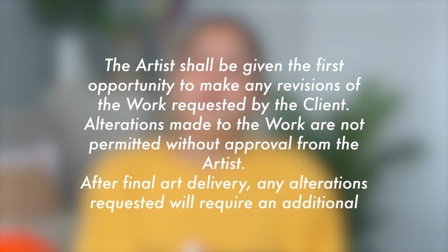The artist will be given the first opportunity to make any revisions to the work requested by the client. Alterations made to the work are not permitted without approval from the artist. After final art delivery, any alterations requested will require an additional fee.